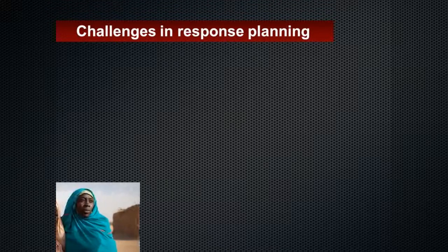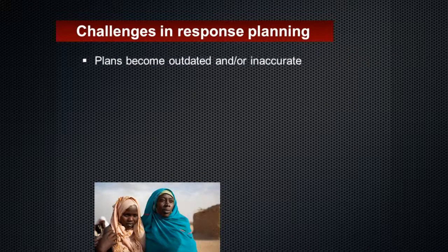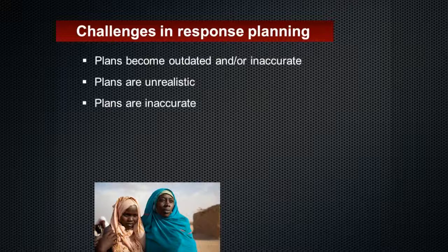Some challenges that you may meet on response. Developing a response plan. Plans become outdated and/or inaccurate. Plans are unrealistic, including too many activities which cannot be achieved within the time frame or in the local context. Plans are inaccurate due to inadequate or ineffective investigation, verification, and analysis of data. Plans are not accepted or owned by WASH actors or affected communities due to inadequate consultation and communication.